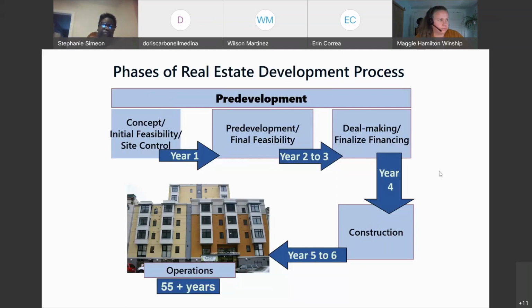Now, there are some places that can give you pre-development expenses back, but most likely it will not be until your project is fully funded. You have to be prepared to have at a minimum $50,000 on up while you're waiting for your project to start construction, meaning that you have done your closing, a soft closing. If you get funding from the state, they do a soft closing. They don't act as a bank, but they give you the award to say you are now allowed to start your project, again on your own dime.